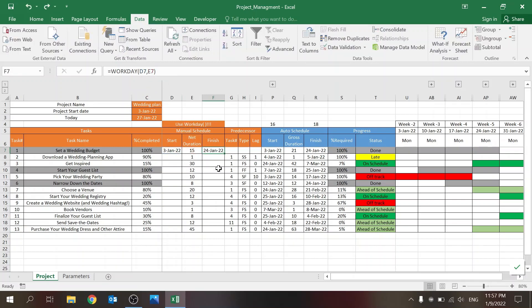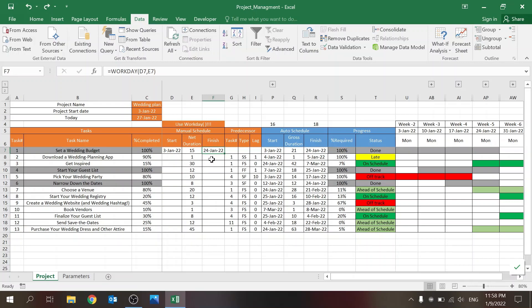You have a start date and a finish date. I'm using a function called WORKDAY, which is a very nice function that only takes into account working days. You can see this task starts on the 3rd of January with a 15-day duration, but the finish date is the 24th — not the 18th — because it accounts for weekends. I highly recommend using that.